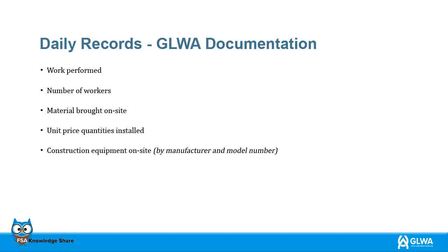What was the work performed? How many workers were on site and what materials were brought on site? Unit price quantities that were installed, and what construction equipment was on site during the work performed. This needs to be listed by manufacturer and model number.